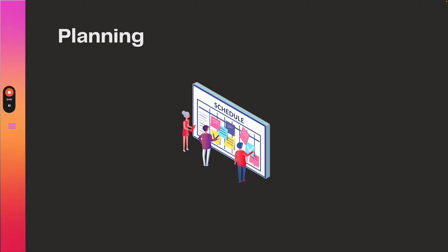And then finally, consider the resources that you might need in the timeline. The obvious one is time, but consider things like people that you might need, some subject matter experts, equipment, budget to pay for some of these no-code tools, and make sure you develop a realistic project timeline that takes into account all of these things and some of the key phases and milestones that you want to hit.